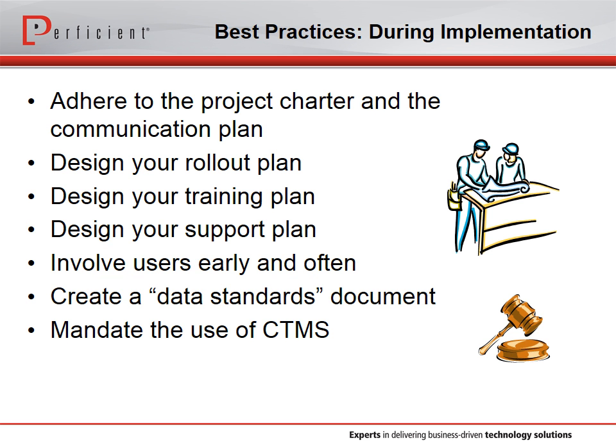Will you cut over studies that are already in progress, or will you maintain two systems for a while? So once you determine your rollout plan, you can begin formulating your training plan. If all the users will go live at once, you'll need to plan for training all at once. If you will make the transition study by study, you might want to train one study team at a time.